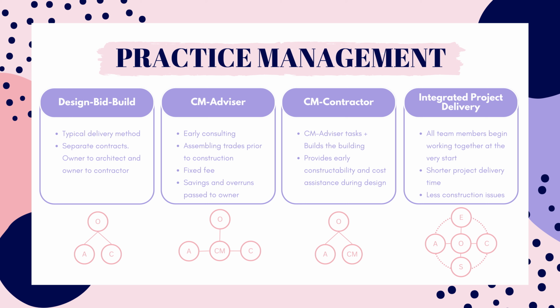In CM as contractor, the owner contracts with the construction manager for 2 phases, pre-construction and construction. So for this one, the CM is the one building the building. They do everything the CM as advisor does in the pre-construction phase, and then they build it.